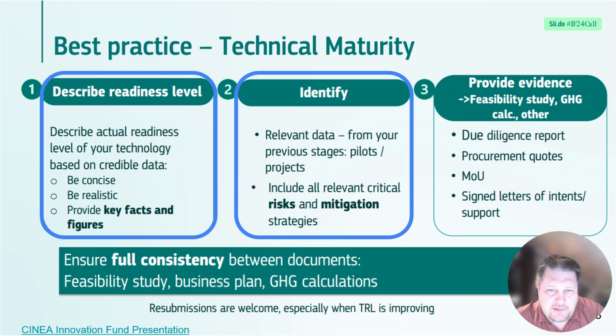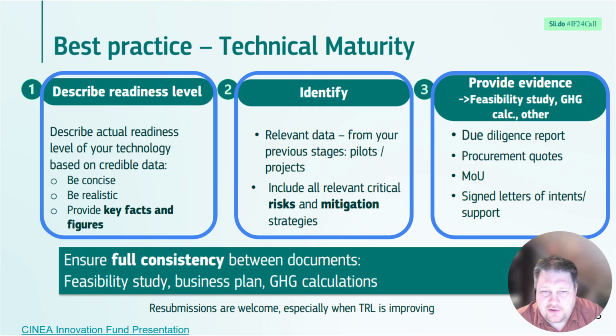Any supporting documents that can provide confidence, like a due diligence report, procurement quotes, memorandum of understanding, signed letters of intent and support, feasibility study, etc. All kinds of documents that support your technology and the risks and the risk mitigation actions are really important to include here.